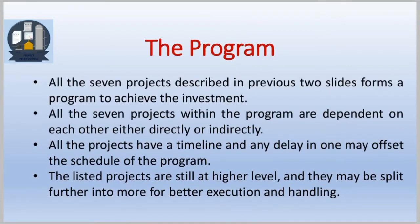All seven projects described form a program to achieve the investment objective. All seven projects within the program are dependent on each other, either directly or indirectly. This dependency may vary — it may have a relationship as simple as finish-to-start, or it may be finish-to-finish, or it may be a complex relationship. All projects have a timeline, and any delay in one may offset the schedule of the program itself.